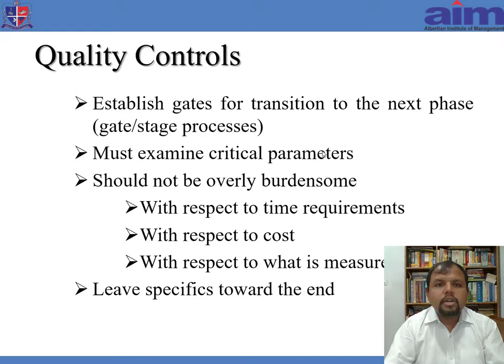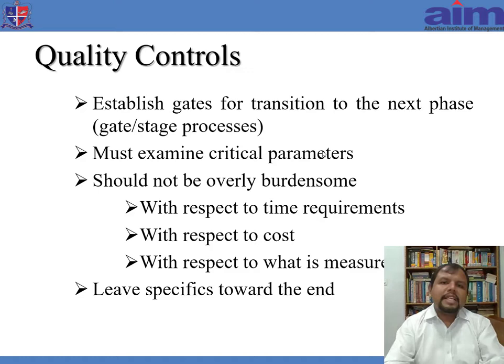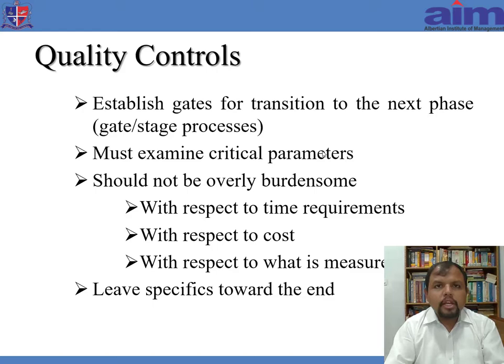The next step is quality controls. Establish gates for transition to the next phase — after each phase there has to be a quality check, and we are supposed to examine each critical parameter. Time shouldn't exceed what was set — the project has to be completed on time. Cost shouldn't increase beyond what was budgeted. And quality shouldn't be compromised.